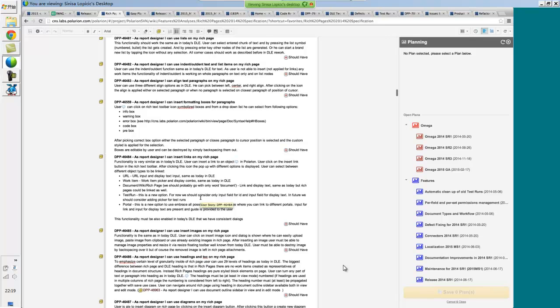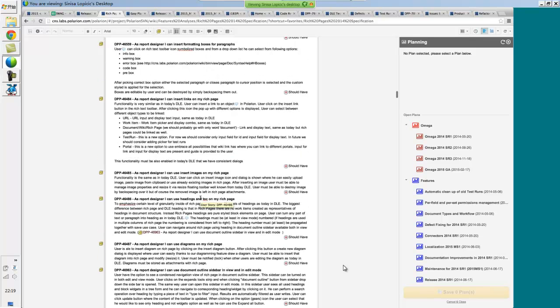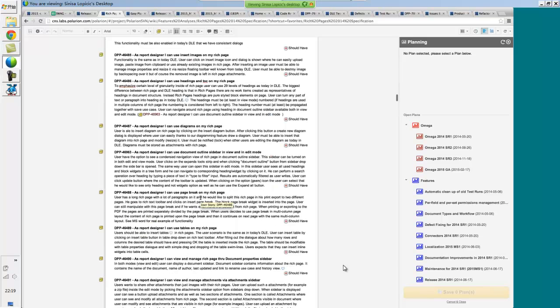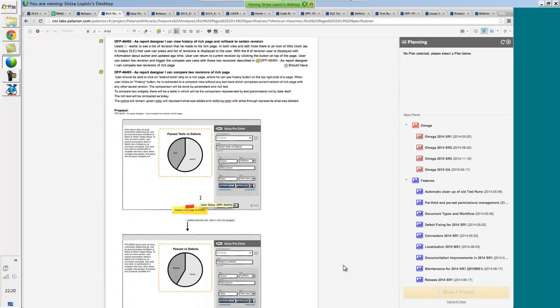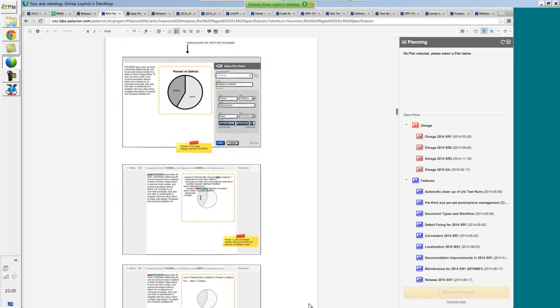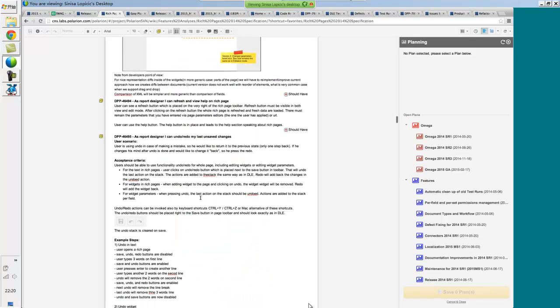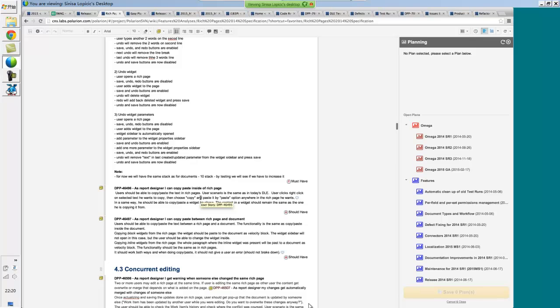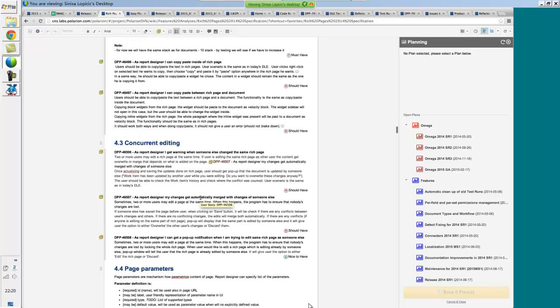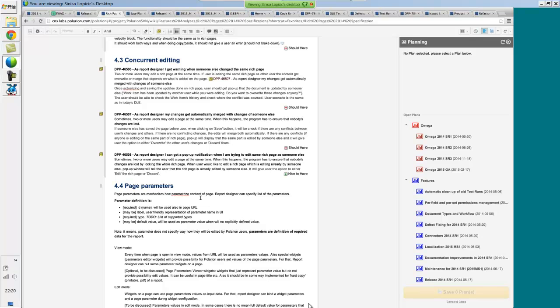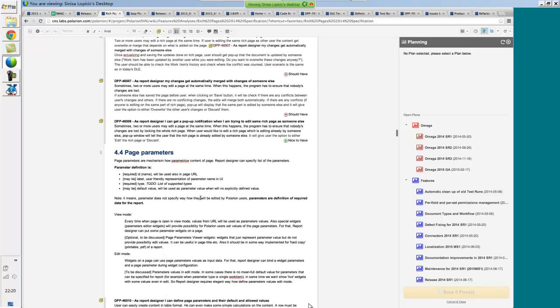And again, I'll show you a little bit later about the backlog and what we do. We utilize it more and more, but we do have more of an on-and-off setting when we decide what should go in. We obviously have must-have and should-have items that are planned for the release and planned to be included in development. Then we also have nice-to-have features, which usually drop off due to the focus on getting the major components in. So this is, as I said, one of the projects that is still in progress.